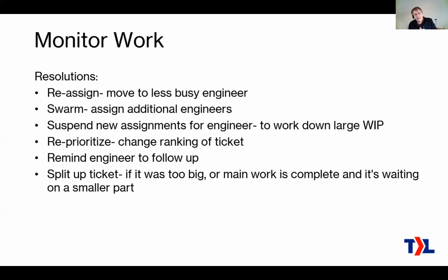One is the work that's already been done. Okay, so that ticket is just complete already. It always feels good to be able to complete a ticket. Then you make a new ticket that represents the 20% of the work, and you can prioritize that like a new ticket, or you can put it into the calendar if that's what that calls for.